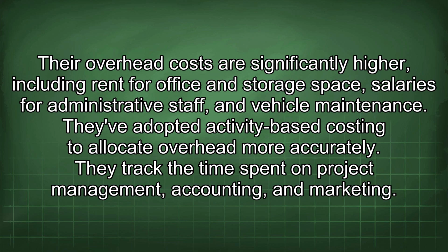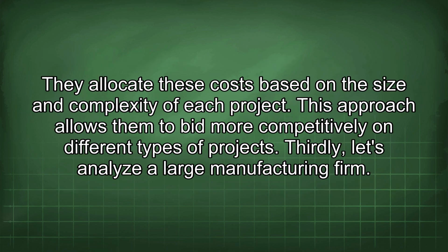They've adopted activity-based costing to allocate overhead more accurately. They track the time spent on project management, accounting, and marketing. They allocate these costs based on the size and complexity of each project. This approach allows them to bid more competitively on different types of projects.